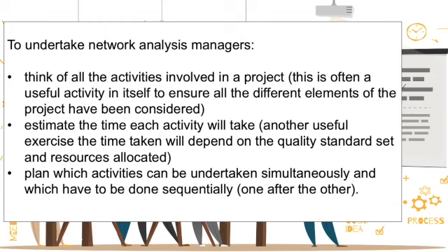So critical path analysis helps to identify the critical path, which is a sequence of activities that must be completed on time for the project to be completed within its scheduled time frame. By focusing on the critical path, project managers can identify potential delays and take appropriate actions to ensure that the project is completed on time.